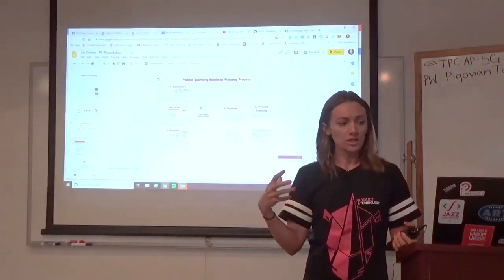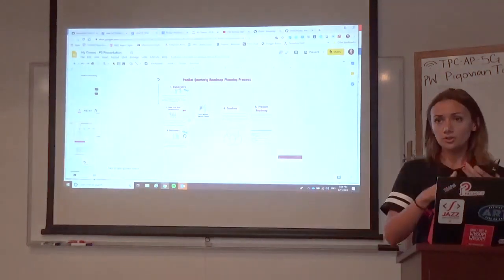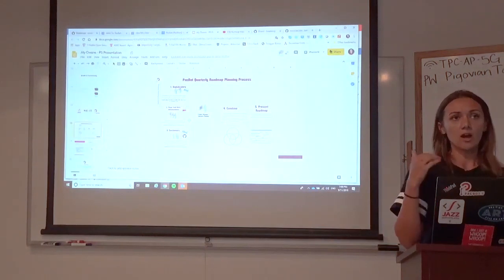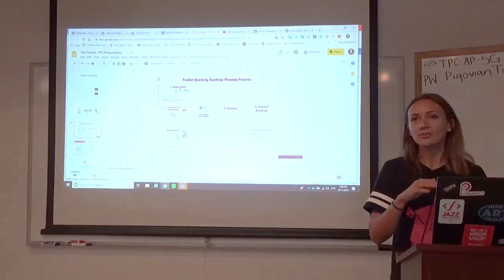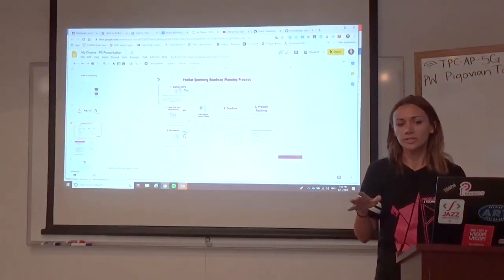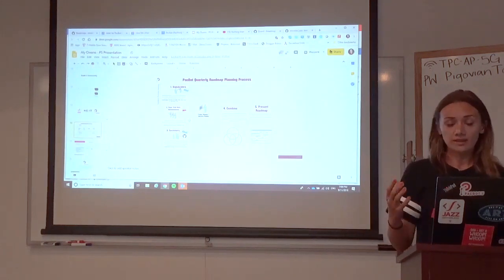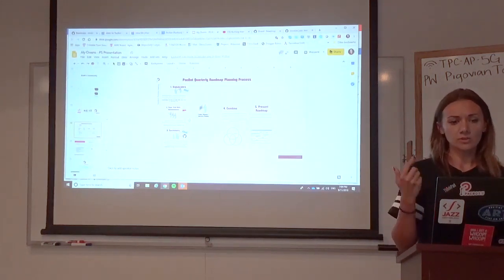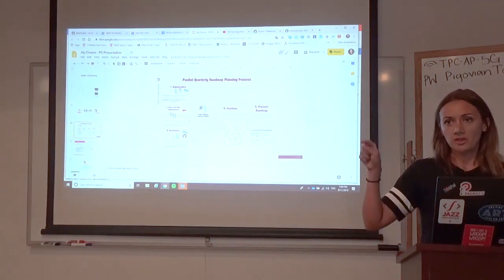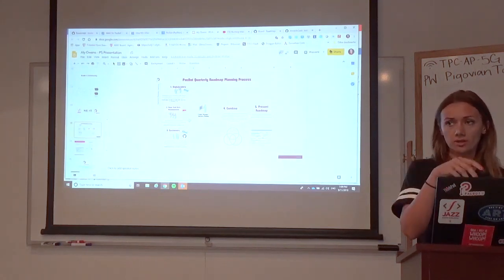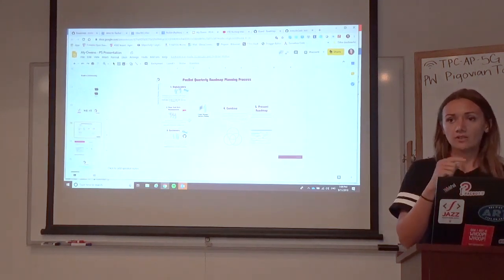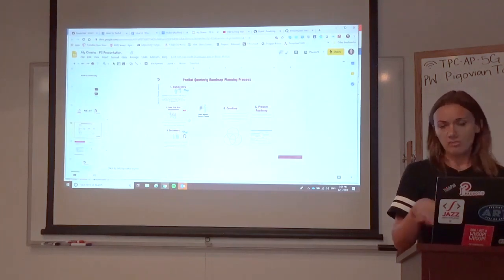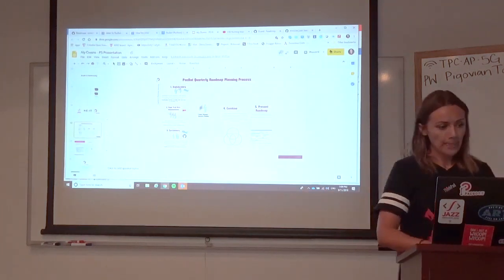A week later, we combine all the features that are external, internal, and our technical debt or something that needs to be done. After that, the roadmap is done. It's all in AHA. I just PDF it, and I send it out both internally and on GitHub. So that's my way of doing it.